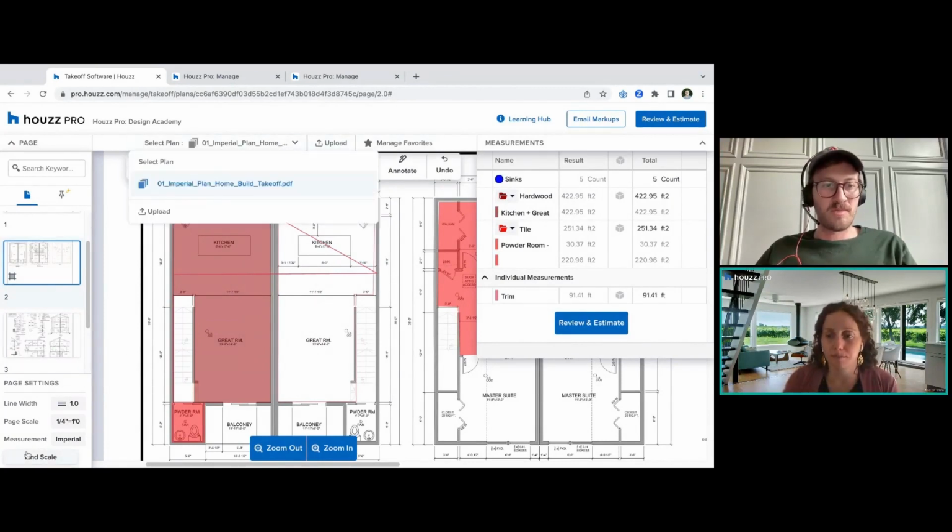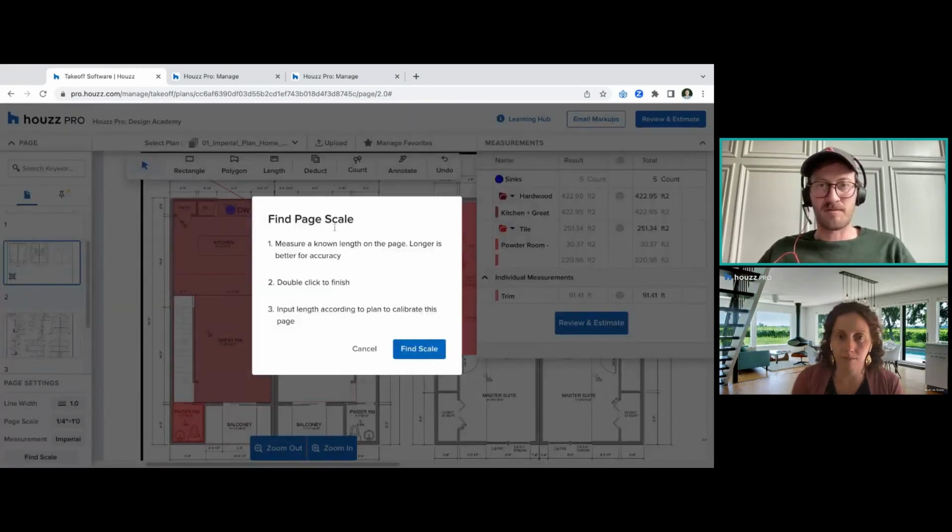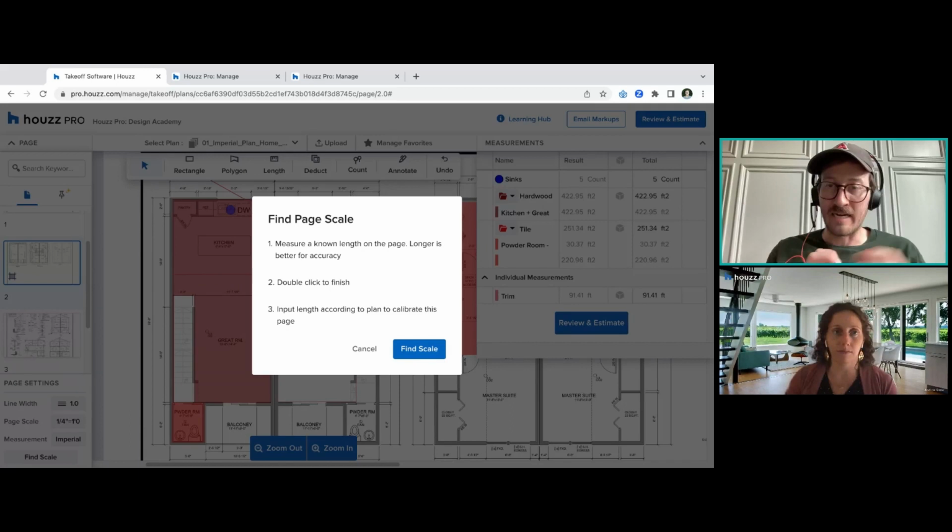Yeah. So ultimately, for the most part, it actually should be able to pick up the scale based on the render that you're bringing on whenever you upload it. But if it's giving you difficulty, I am pretty confident, especially based on these instructions, it's very much the same scaling method that we did on our 2D floor plan. So you would want to make sure that you're drawing a line from one wall to another of a measurement that you know, like 25 feet or whatever. And then you type that in manually, and that's what sets the scale, because then it captures that line. And it's like, okay, well, this is 25 feet long. And then it's able to optimize the rest of the room to follow that same scaling pattern.